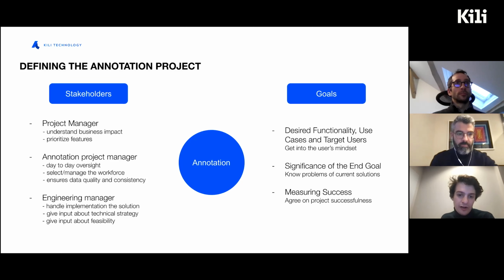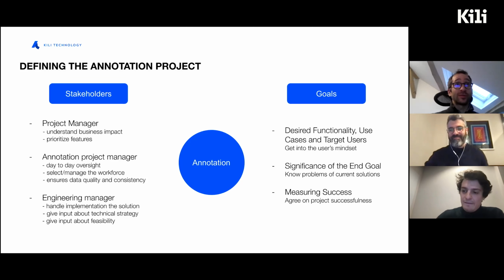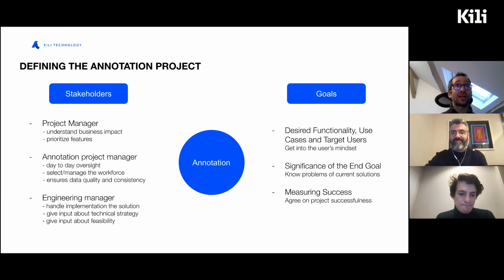So having clear owners and stakeholders for each part of the project is really key to have a fluid way of working. So I completely agree with Paul, and I have another example which is related to his example. It was not 2 clients, but 5 clients. We were working with a research lab, and you had these 5 clients, and some of them were answering the question answer files, some of them were attending the meeting and not others, and it was a real nightmare. So on the client side, be really clear about who is really the owner of the project. It's super important, otherwise it's a nightmare.